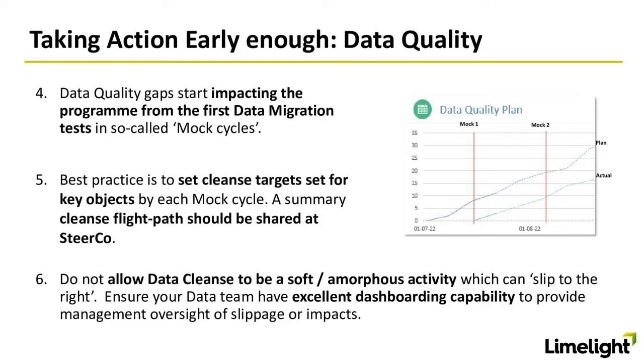You need to share it at a steering committee or operating committee level, so it's some sort of a governance forum. You need to have excellent dashboarding so that the impact, the so what of not achieving those goals, are understood, because ultimately what these things tend to impact is the ability of the data migration team to perform a full extract, transform, and load as they set out to do for each mock cycle. So good dashboarding is really, really key to this.